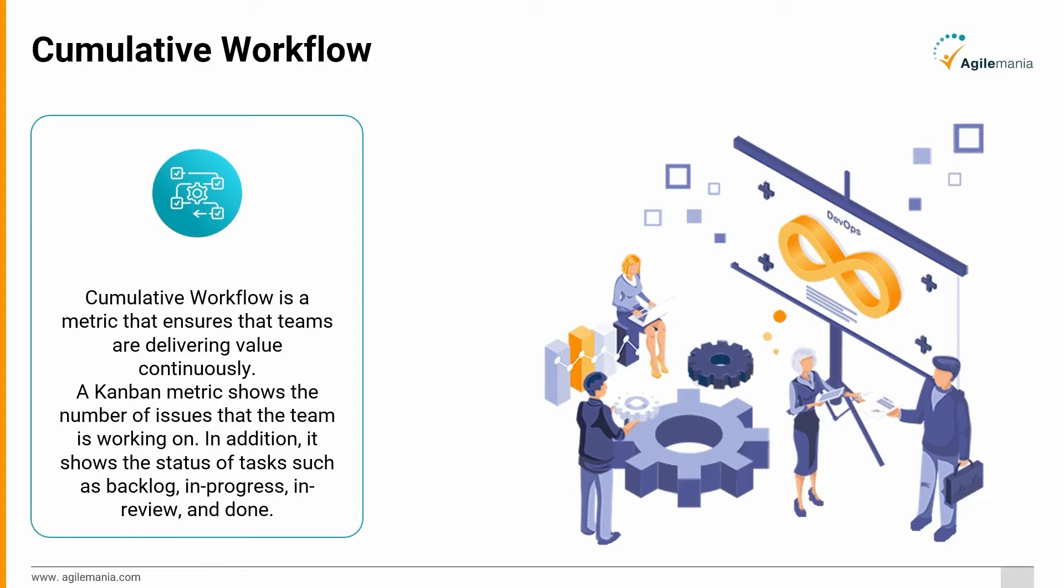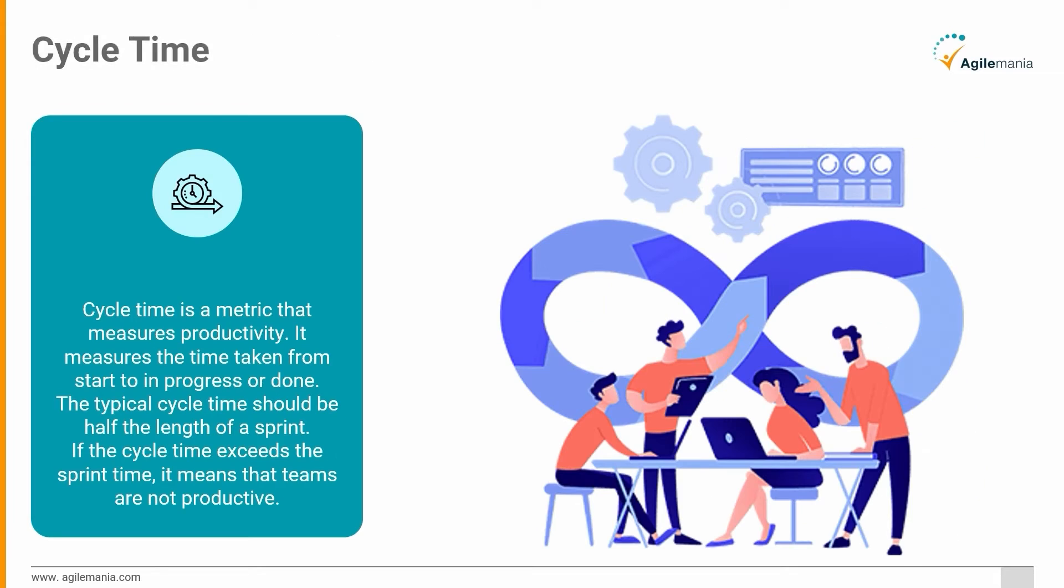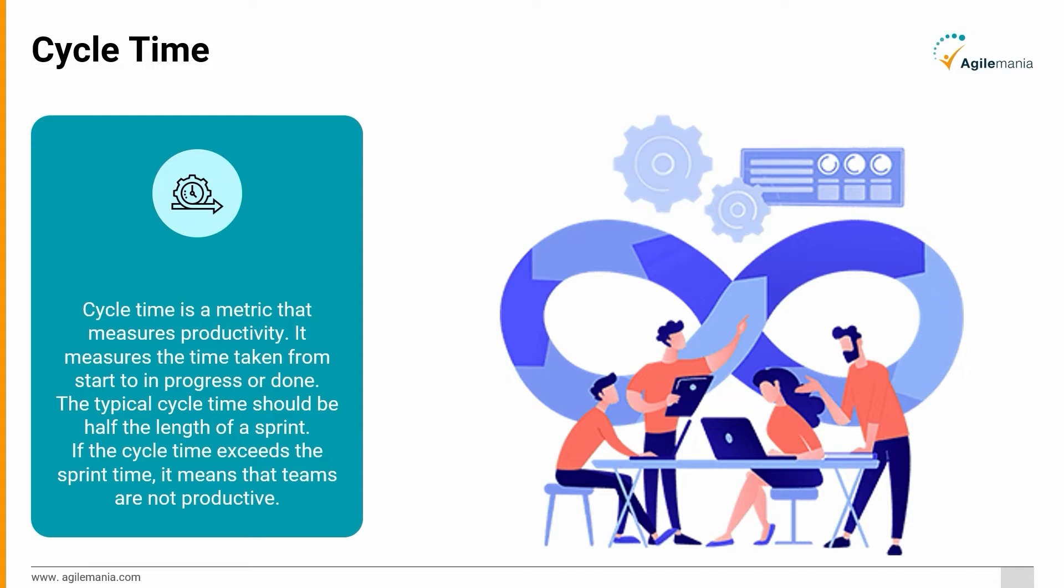Cycle Time: Cycle time is a metric that measures productivity. It measures the time taken from start to in-progress or done. The typical cycle time should be half the length of a sprint. If the cycle time exceeds the sprint time, it means that teams are not productive.